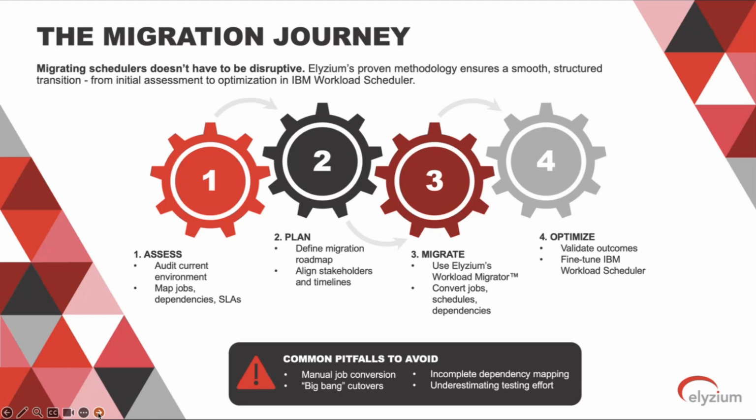So when you plan in phase 2, effectively that becomes your workload automation strategy. So what are you going to migrate in the first step? And then what are you going to optimize in the following steps? Because the way things are done today may not be ideal. How do you want to change that? Rather than changing it as you go along, you want to potentially migrate as is, because that's the quickest way of doing it. And then plan an optimization phase where you then consolidate. Once you've consolidated, you can then make those changes as part of optimization.